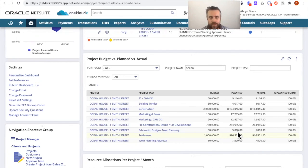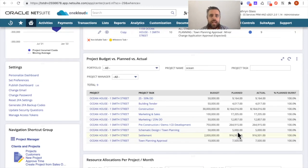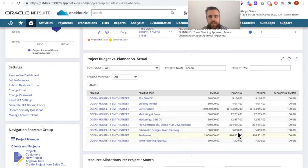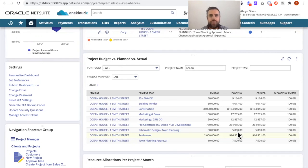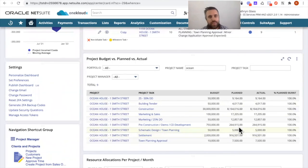And what that does is actually creates a separate tab on the project task to have purchase orders created or supplier bills created against an actual task that you want to allocate those costs to. So that's where this is coming from.